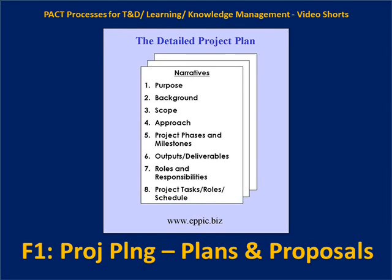This gets articulated in section four of the detailed project plan. In section five we identify what phases and milestones we're going to use to structure the project. In section six we define specifically the outputs and deliverables in great detail — what are the clients going to get for this effort, what are the deliverables in the context of the phases and milestones, and what level of depth of information might one find in these outputs?